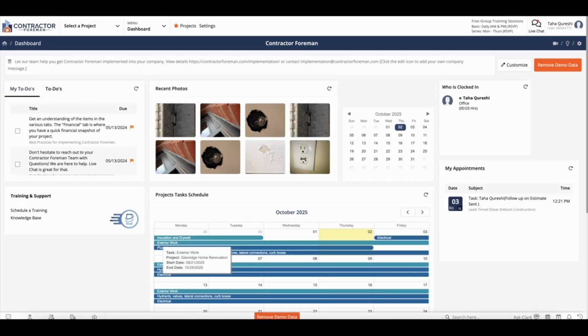And you might ask yourself, well, why do I need a subcontract? I can just get the invoices or the bills from the plumber and just pay them off. Well, here's why you should have a subcontract. It leads to accurate cost tracking. Every subcontract agreement is logged as a committed cost.